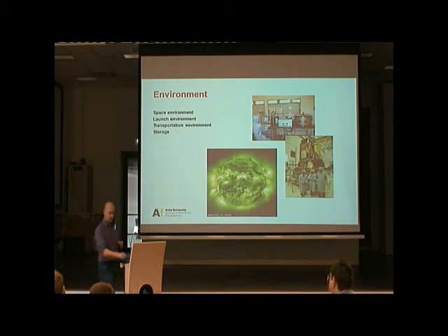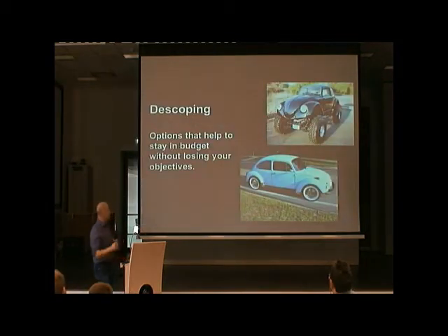So you have to take this also into account: how long you have to wait before your satellite is launched, and where and how you have to store it. It might actually be quite expensive to store your satellite for an extra 3 years in a clean room under very regulated humidity conditions.